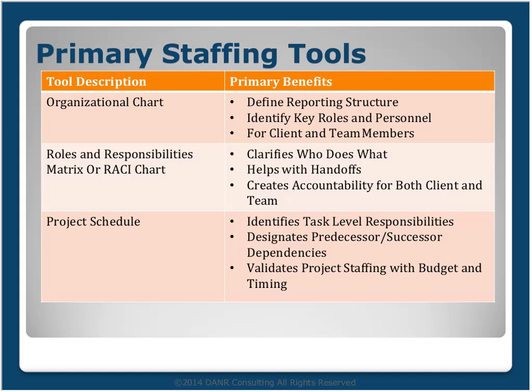Maybe most significantly, schedules, when done properly, should allow you to validate or cross-check your staffing plan with your budget and desired timeline. For example, if you have a task with 40 hours of work and you've set aside a duration of 2 days for that task and a budget of $1,200, and your staffing plan is to have one principal engineer at a bill rate of $125 per hour do that task, you can already see the discrepancy. There's no way that one individual is going to do 40 hours of work in 2 days, and there's no way that someone billing at $125 an hour is going to do a 40-hour task for $1,200.